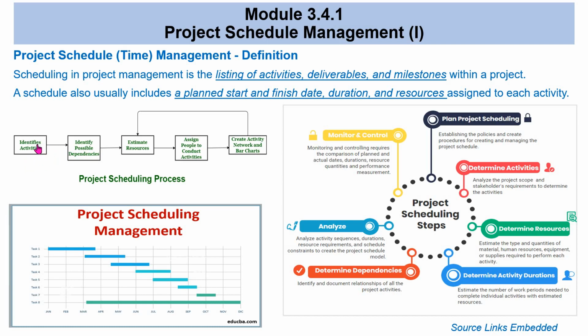Those are the activities. And then you can look at the dependencies. Which one do I need to do first? I need to first make sure that I have the materials in, or the money to be able to purchase the materials before I start. And I need to do the foundation first, such that when I start building the side walls of my store and the roof, I don't struggle with any other activity.